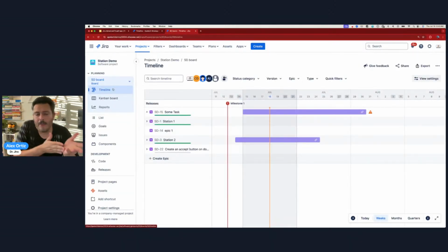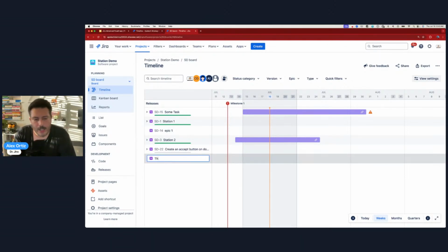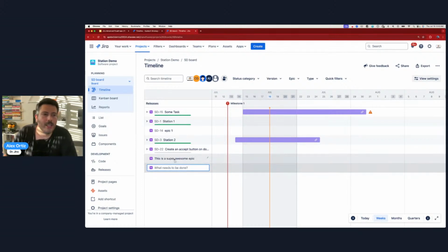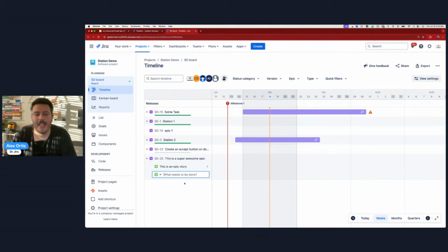You do have the timeline. If you've seen any of my other videos, you know how much I love the timeline because in the timeline, we can create the epic, right? This is a super awesome epic. So I can create my epic. And then here I can create my story. I can change this to a story and go, this is an epic story, right? And it's fast, intuitive, quick, but there's limits.